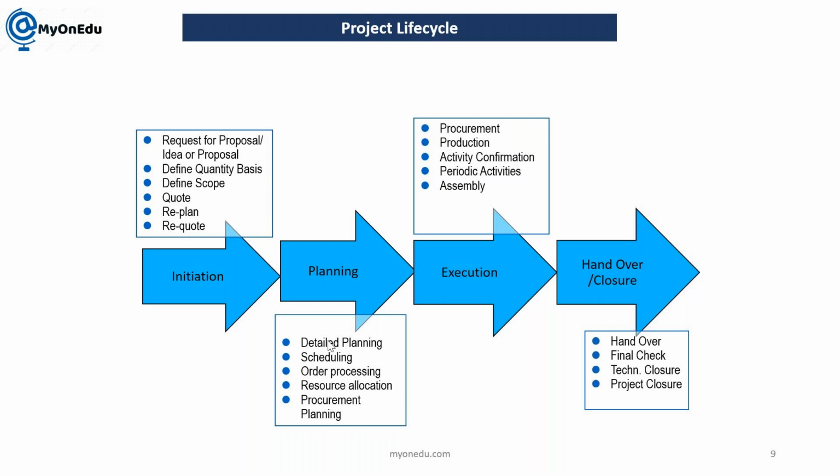Then, once everything is done, we need to prepare a snag list. Both parties have to work on the snag list, and then we need to find an approach to rectify this snag list within that particular period. So we have a taking over certificate, where the client provides a certificate to the contractor saying that yes, it is going to be taken over. And then sometimes we also have defect liability, where in certain periods support needs to be provided. So this is a typical project life cycle.